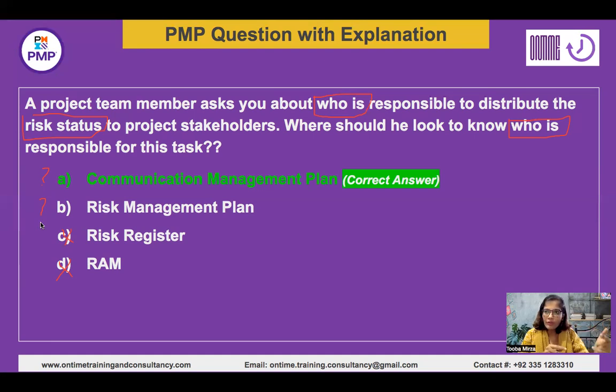The number of iterations you should be doing for your risk management, the number of times the identification process should be carried out, how many times the risk register should be updated, how frequent the monitoring exercise should be done, and how frequent the risk status report should be updated. Everything would be there in the form of methodology, frequency, roles and responsibilities, and certain other categories and content.